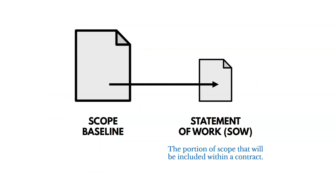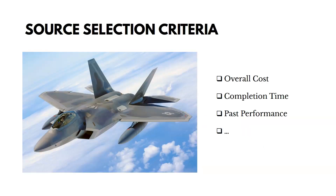To illustrate the Statement of Work: we're taking the scope baseline and pulling out portions that will go into a contract — that's the Statement of Work. And here's an example of Source Selection Criteria. If we're trying to buy planes, some ways we might score sellers include: what's the cost they're going to charge us, when can they complete it, and have they performed well on previous projects? Those are different ways to select or score potential sellers.